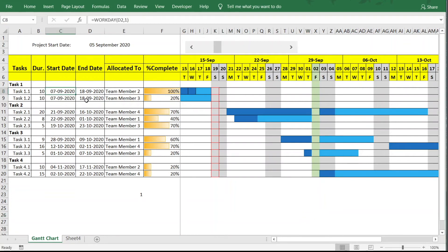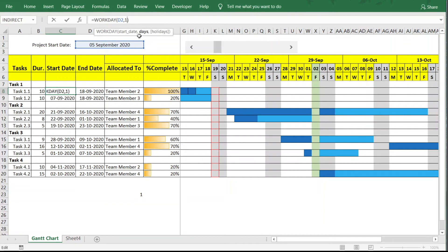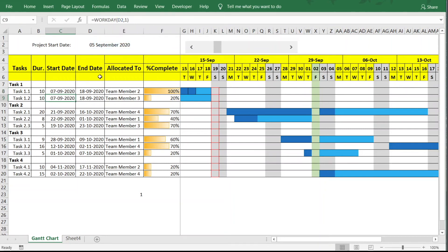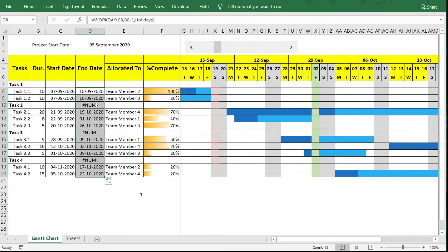Next we need to adjust task start and end dates to account for holidays, just as we did for weekends. The WORKDAY formula already has an optional 'holidays' parameter. We simply add the 'Holidays' named range as the third argument: =WORKDAY(start_date, duration, Holidays). This ensures task dates are pushed past any holidays in the list.